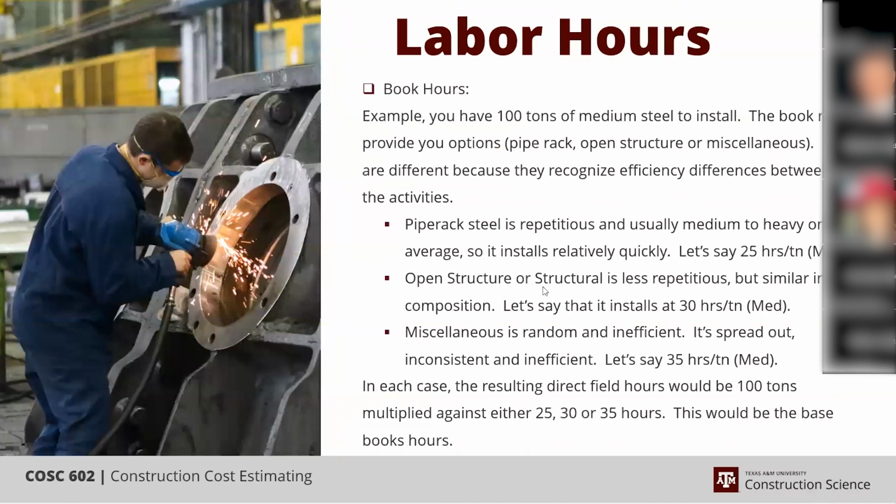Anyway, that whole safety concept, even though it's something that we need, carries a cost with it, and that cost is primarily in productivity. So if you know your system's sitting on all those old production rates, then before you ever start, you need to apply 5 to 15%, maybe 20% to the rates just to get them up to current standards, and then you can start moving forward from there.